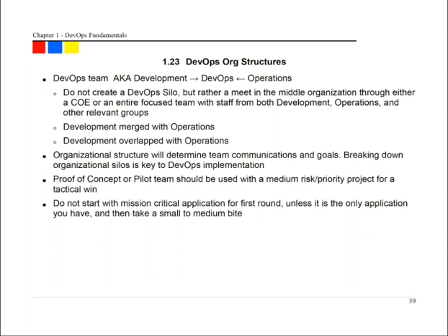A project-based organization, this is more common in enterprise IT, is one where we decide as an organization we're going to implement a new warehouse management system. And I'm going to assemble a project team, and I'm going to say, hey team, you're going to be working together for the next 6 months, and your job is to take the warehouse management system from version 1.1 to version 1.2, or go implement this COTS product, or whatever it happens to be. And what will happen is the project team works, they finish, and then they're done. They disband. The project's over. People go on to something else. The project ceases to exist from an organization point of view.